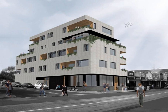And we go further than that to coordinate other materials to be there on site before we put a lid on for the next lift. So there's a lot of planning with a lot of subcontractors and a lot of suppliers, and it has to really work like clockwork. We know it never does work like clockwork, but we try our best to use this time up front to really plan and have contingencies in place for things that would inevitably go wrong. We have arrangements with manufacturers for storage, and we negotiate certain prescribed times around certain deliveries where we have storage arranged. But as we all know, a week or two on site, a bit of inclement weather, those times can blow out very quickly. So we want to make sure that we're responsibly calling up this material as we need it, and it's not being stored incorrectly or for prolonged periods of time.